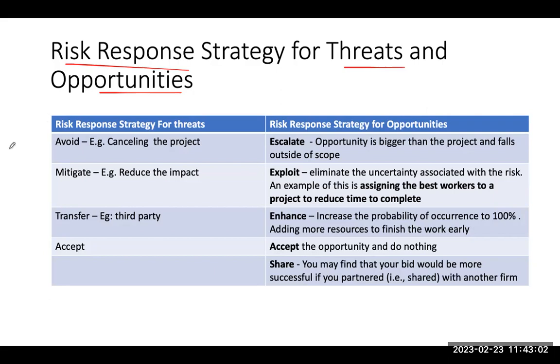And what do we do with an identified risk? We have to do something about it, right? So how do we respond to each risk that is identified? If it is a threat, what are the different strategies we will follow? It could be avoid, mitigate, transfer, or accept.